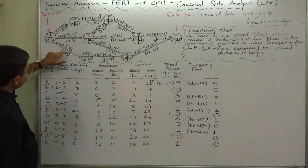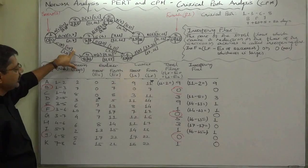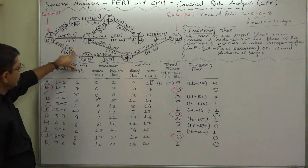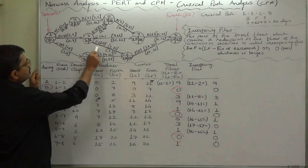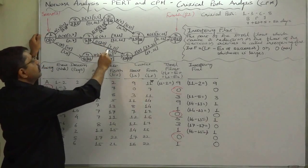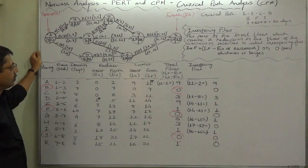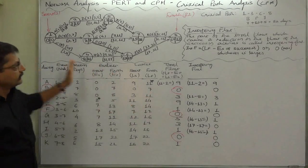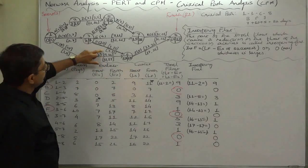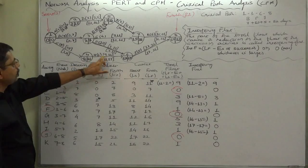So now 3 plus 8, its latest finish time will be 11. And hence the earliest start time of H will be 11. So it affects and that will change the float of H also, and so on.